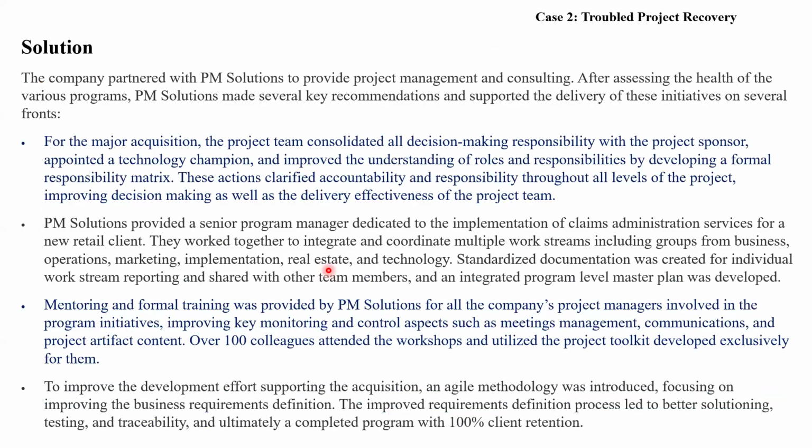In the case background, what they have done was get support from a consultancy company, Project Management Solutions. After assessing the health of the various programs and projects, that consultancy company made several key recommendations and supported the delivery of these initiatives on several fronts. For the major acquisition, the project team consolidated all decision-making responsibility with the project sponsor, appointed a technology champion, and improved the understanding of roles and responsibilities by developing a formal responsibility matrix.